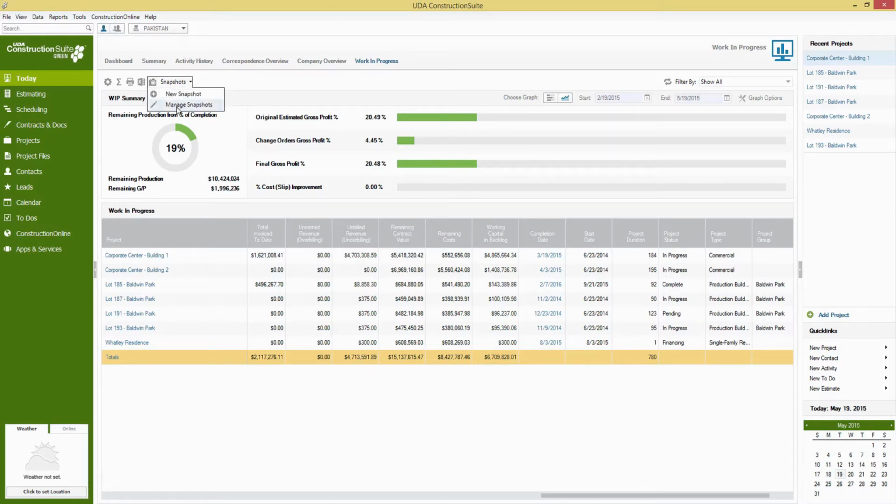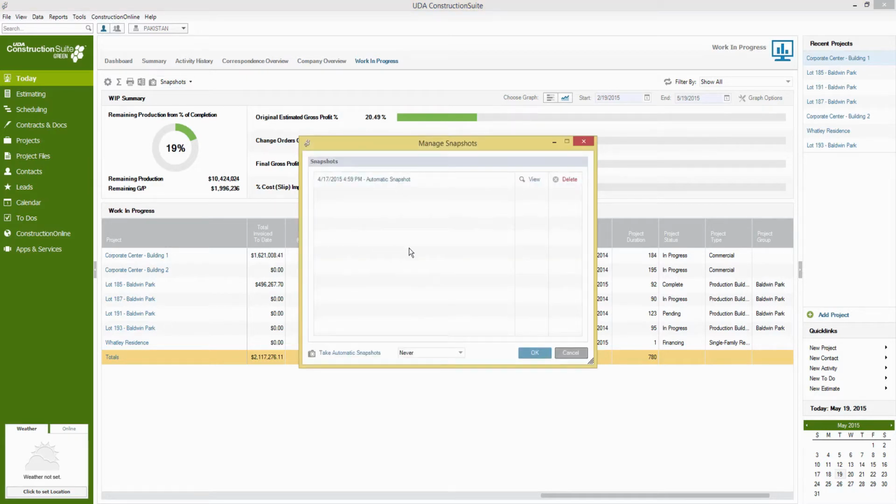Now, there's obviously too many columns here to go into complete depth into, but from this, quickly scan through all the columns here. You'll be able to take snapshots of this information at either any manual point, or you can take automatic snapshots daily, weekly, bi-weekly, or monthly. So from this, you'll be able to really just go back in time wherever you've set one of these and compare those with your current information.